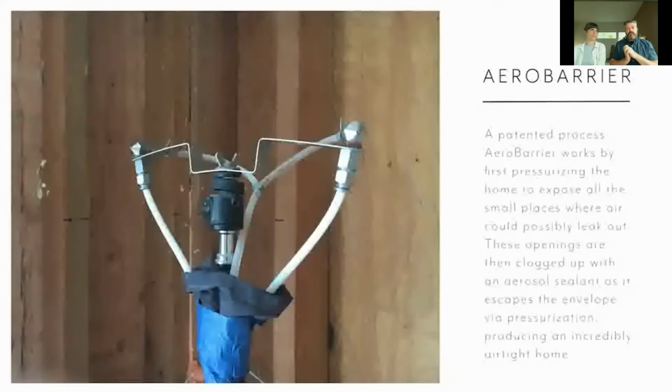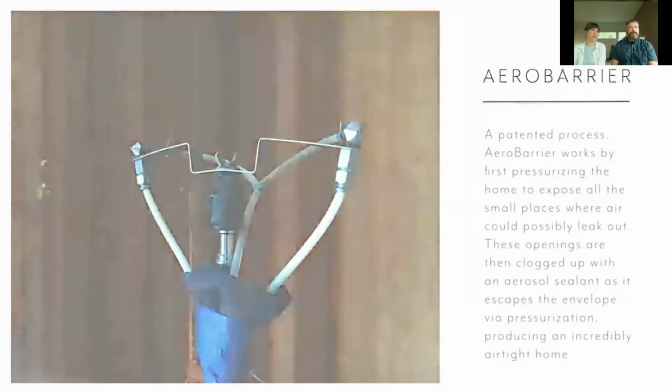Openings up to a half an inch can be filled with this stuff. We did a ton of prep on this with spray foam and tape and all kinds of stuff to get the rating that we got. But it essentially will work for anything. And it was a half day. Yeah, it was pretty quick. It just kind of happened. The guys came and set up, and we had been prepping for a week and a half or so.